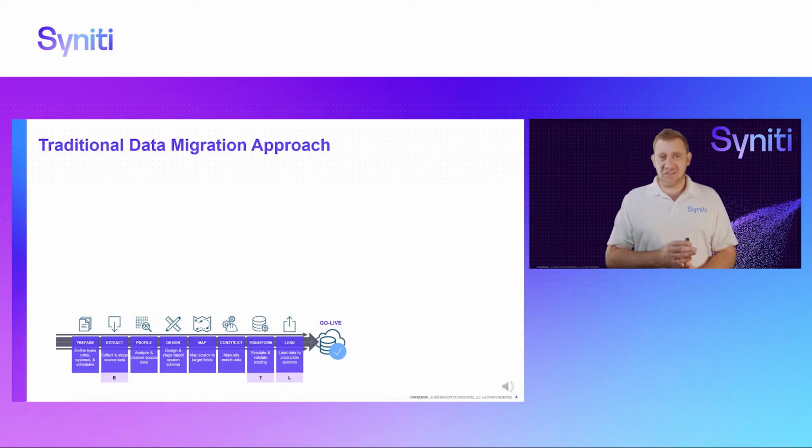You have multiple testing cycles: SIT, UIT, unit testing. So you have to align all of your data activities against that timeline, but you also need to know who's my data guy for procurement, who's my data guy for finance, who are my SMEs in each domain, and who is the person that needs to be contacted if the source system doesn't work, or the target system. So you've got all of these preparation activities that need to go into your planning before you can even think